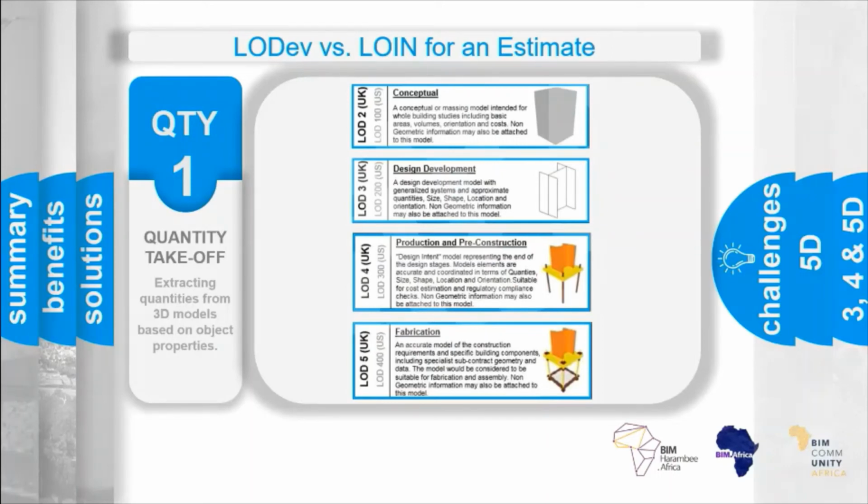The objects in a model are just that. They are graphical placeholders for the finished object, and they don't necessarily represent quantifiable details of all of their measurable parts. And therefore, they don't necessarily have all of the dimensions or the information required in order to cost that object. So if we're putting placeholders in, we need to ensure that those placeholders contain information so that a cost can be allocated and a provision can be made.